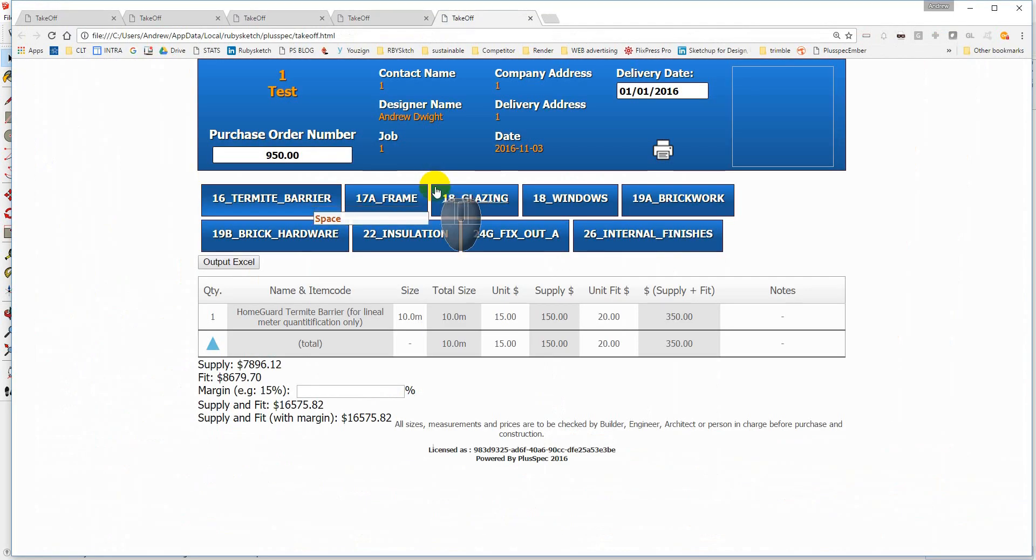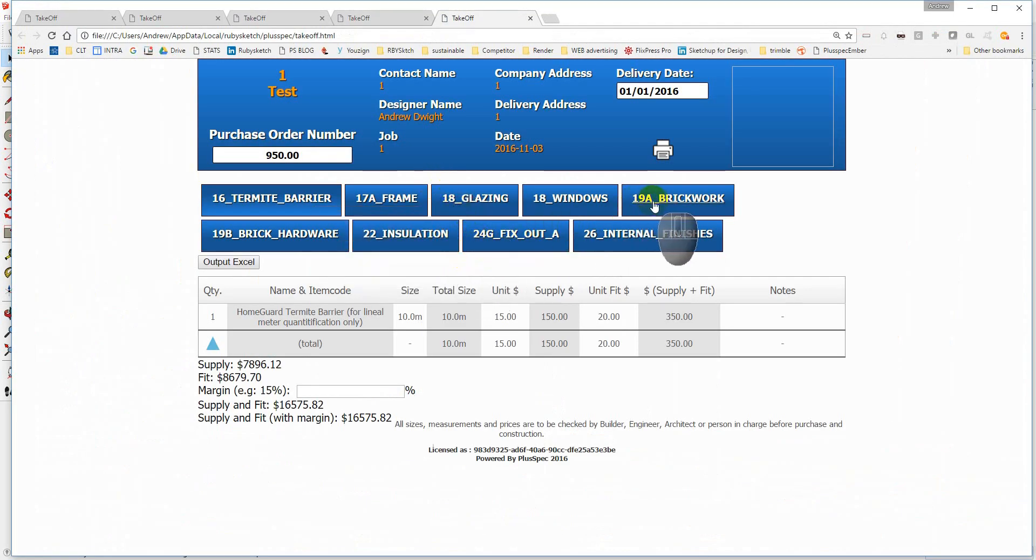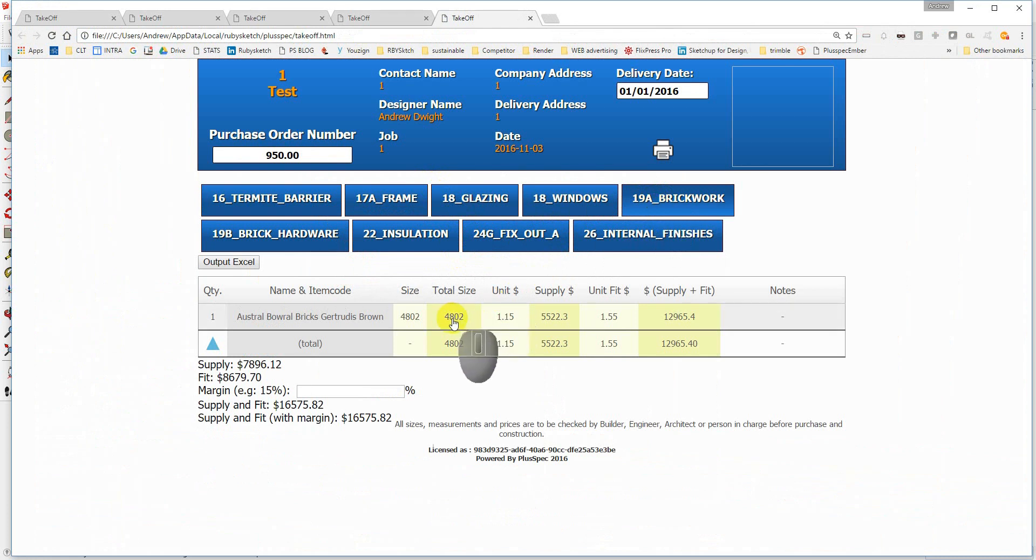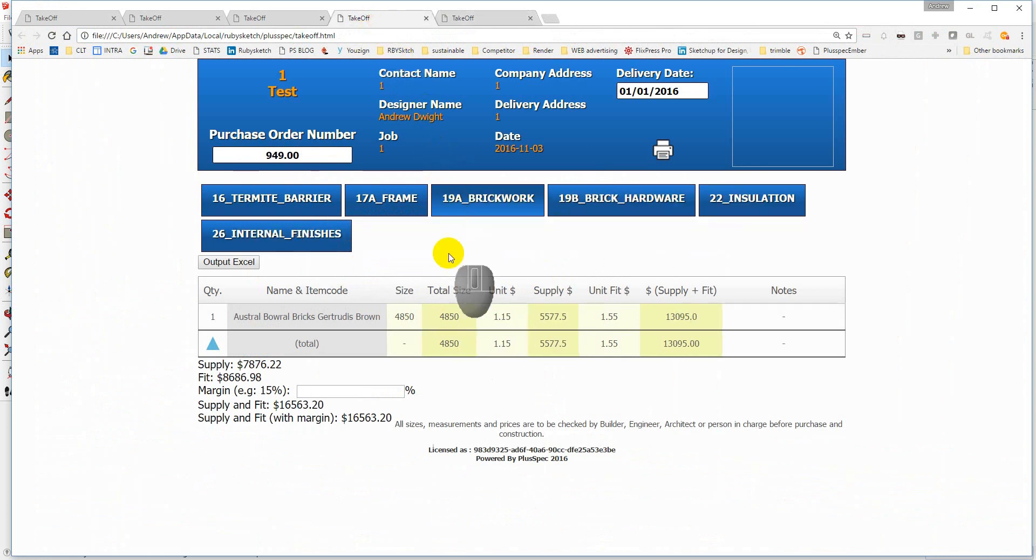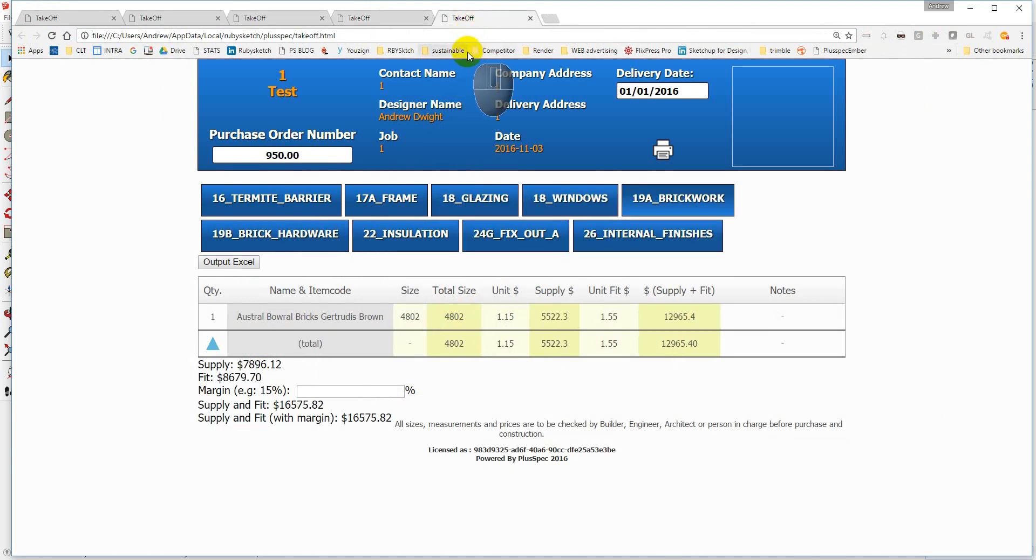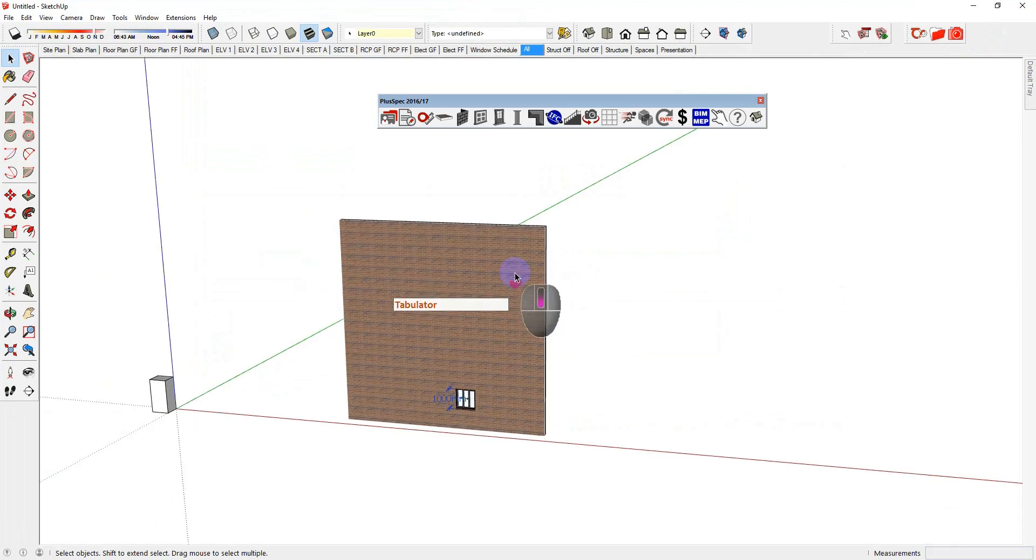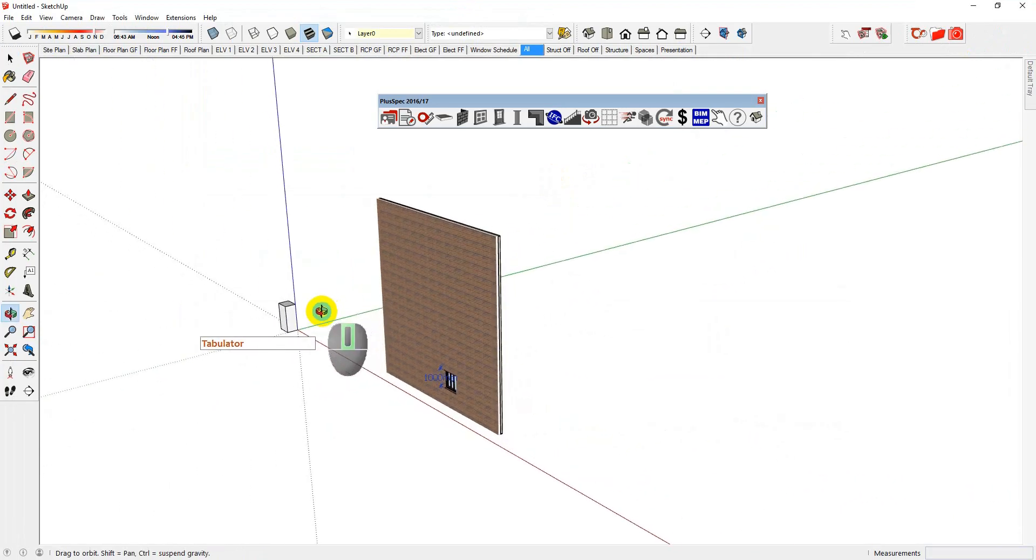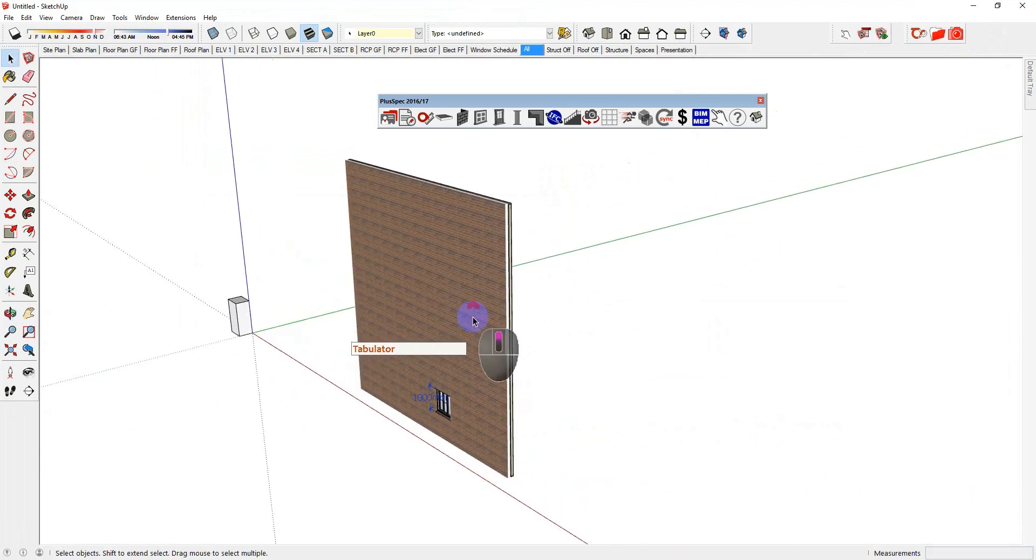So now when I go and do a bill of quantities. Here. Okay. And we went to our brickwork. 4,802 versus the last one, which is 4,850. It's automatically deducting the amount of bricks. That's pretty powerful. You can imagine how much you can get done very, very quickly. And go back to here. Also, I mentioned earlier that we want to segregate different parts of the wall.